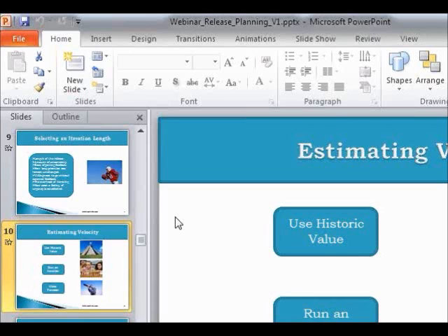So for example, if I want to launch a job site which facilitates users to apply for jobs and facilitates recruiters to post jobs, it may not have the 3 types of searches which I had visualized initially. But since it allows a person to search on the basis of keywords, I am still okay. So a condition of satisfaction is primarily driven by the need to give an interface where people can interact and find a job. Now, with many features, I prioritize the features: which is my must have, which is my could have, which is my should have, and on that basis I move forward.